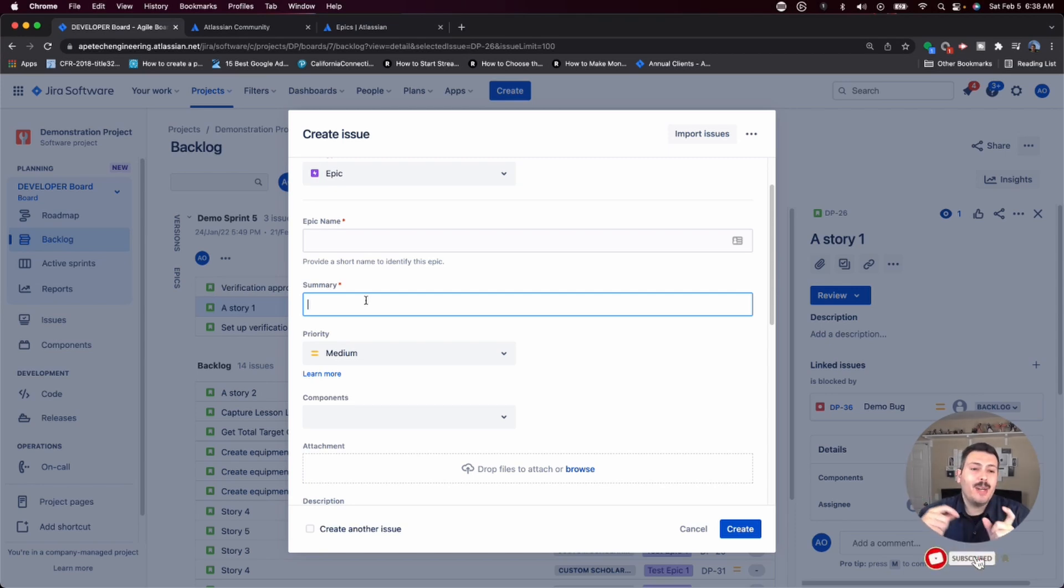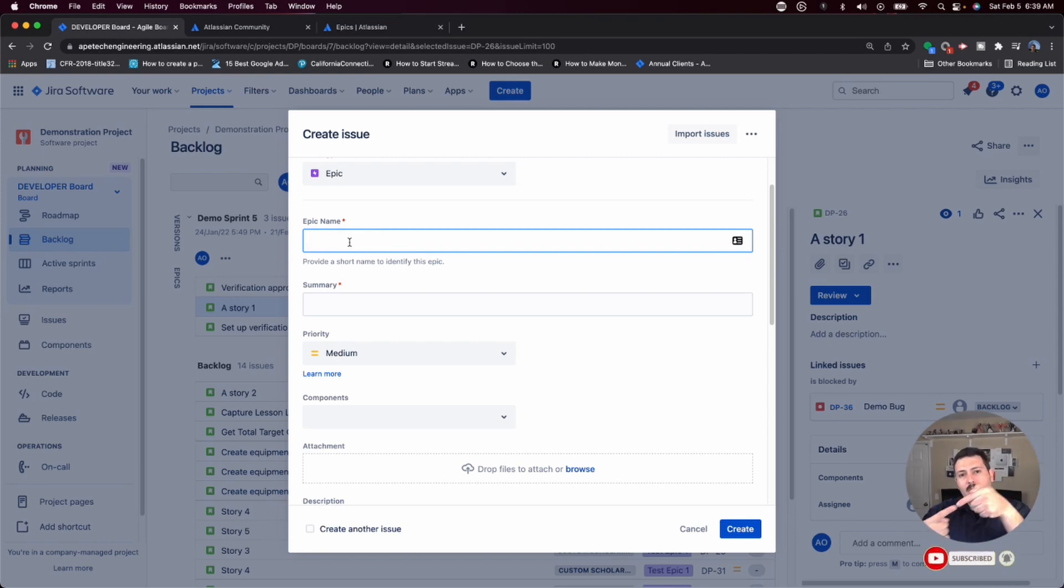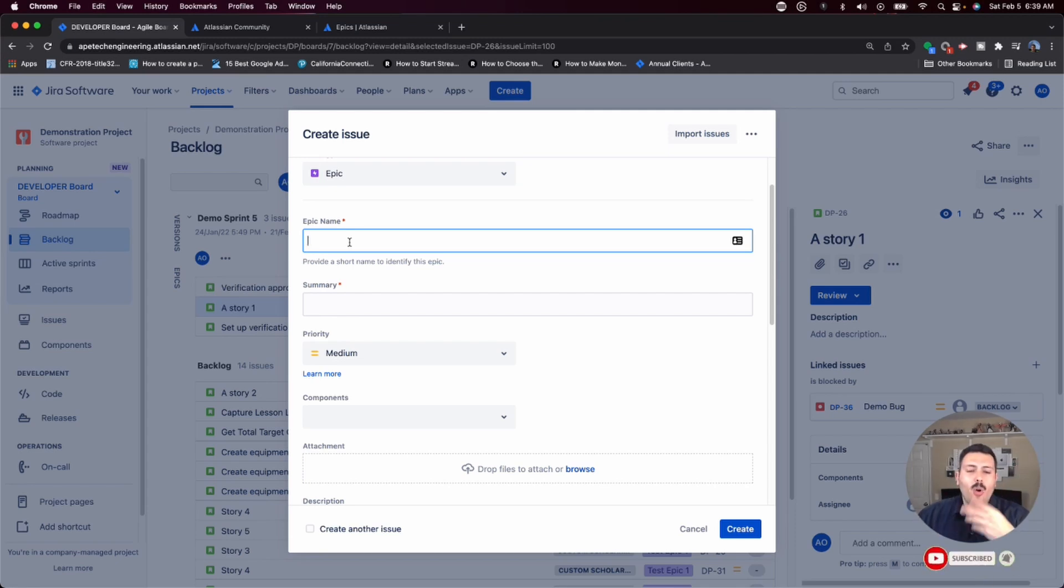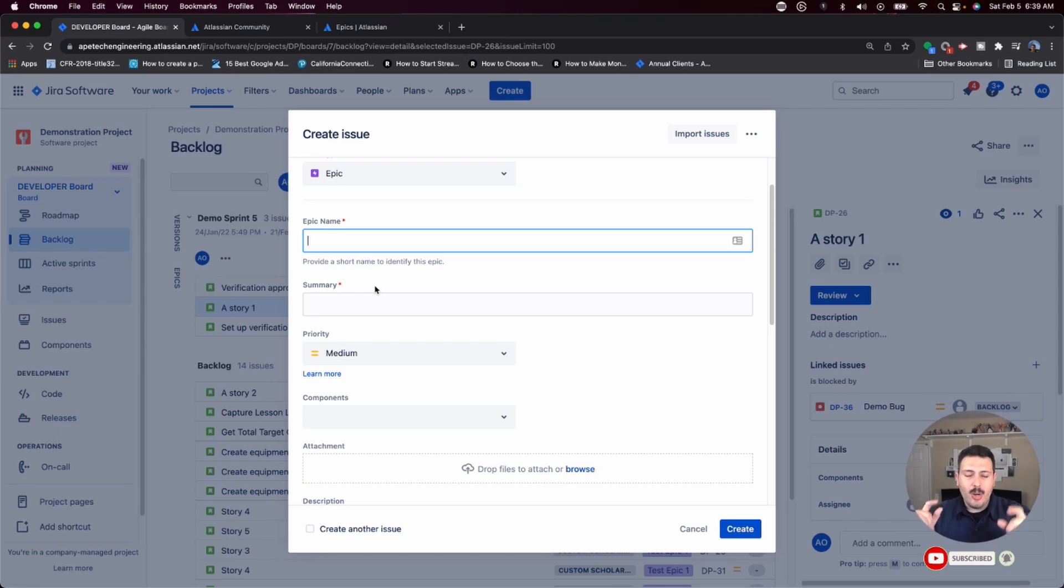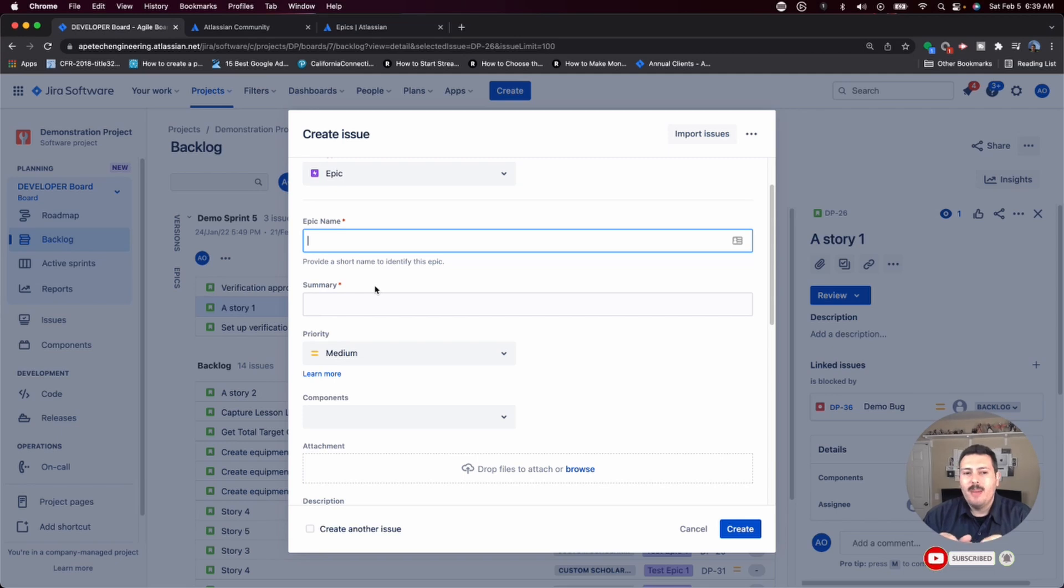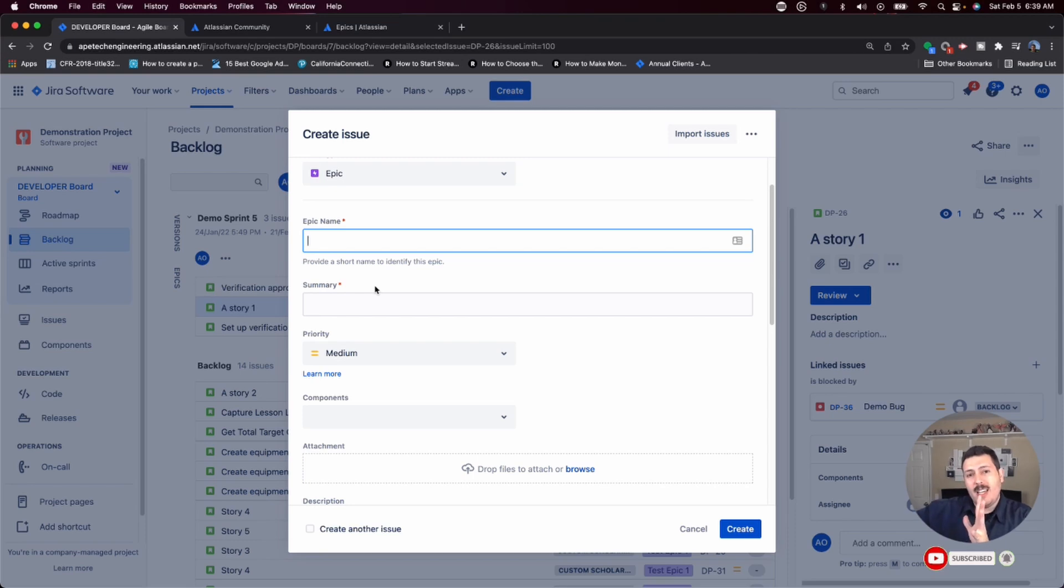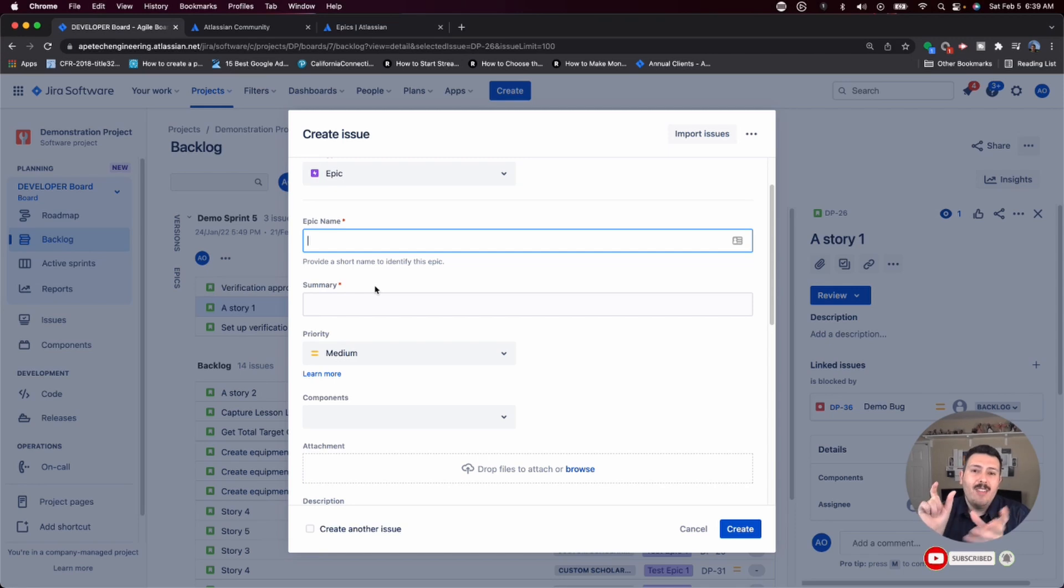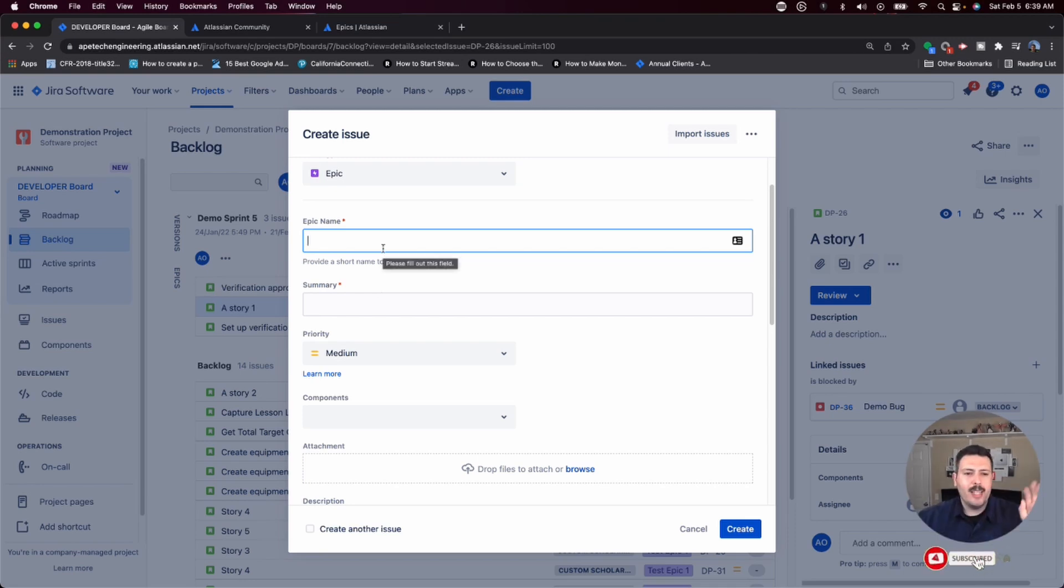Most of the time, I usually give my issues the same epic name as the summary. I literally just copy paste. They're not the same thing. But to the naked eye, they're pretty much the same thing. To the well seasoned practitioner of Jira, they will know that the epic name is actually used at the story level as an epic link to then create the parent child relationship between the epic and the stories that are associated to that epic. And the only tip that I usually give my clients here is if you have like a 200 character title, your epic name should be the most precise, concise, descriptive title you can give it because the epic name is going to show up on every single story. And so if you write out this giant epic name, you're only going to get the first few characters of that epic name. And if it's not descriptive, then it's not going to really help you identify what those stories are related about without actually clicking into them. So that's like my number one tip. If you walk away with anything, give your epic name something that is short, precise, concise, and descriptive.